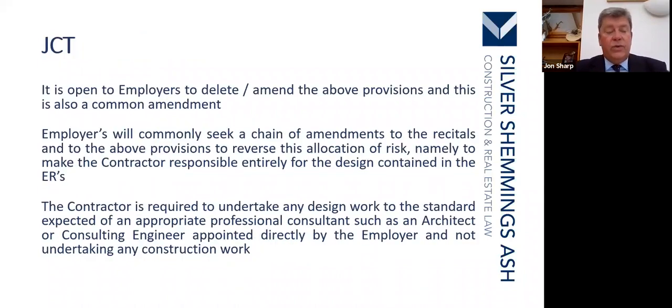Now, it's open to employers to delete or amend the above provisions, and this is also a common amendment. Employers will commonly seek a chain of amendments to the recitals and to the above provisions to reverse this allocation of risk, namely to make the contractor responsible entirely for the design contained in the employer's requirements.